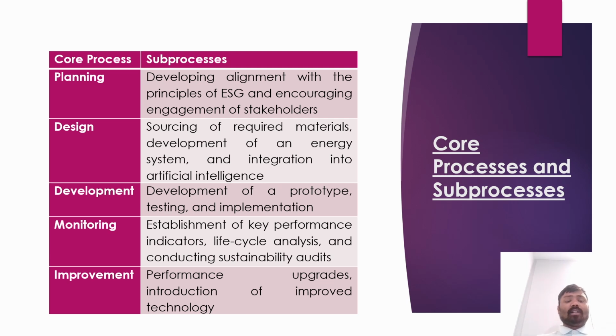The final lane, monitoring and optimization, is perpetual. I broke it into real-time data collection, streaming water, energy, and CO2 metrics to our cloud dashboard; a monthly KPI review meeting covering all stakeholders; root cause analysis applying Six Sigma methods when thresholds are missed; design update backlogs, feeding improvement requests to the development team; and an annual sustainability report publicly shared with investors and communities.